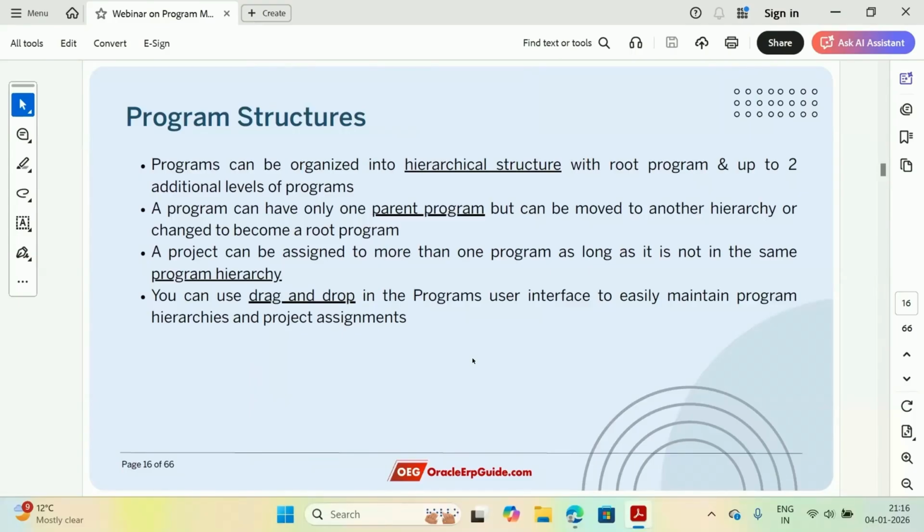Till now, we have been talking about projects under a program. But what about a sub program? You can have a program and a sub program and then projects under that sub program. So a program under a program is also possible. Some companies might have a very complex arrangement wherein they have smaller programs and bigger programs, which also have a parent-child relationship. That is possible, but there is a limitation that you can have a maximum of 3 levels of program.